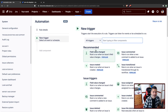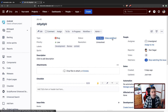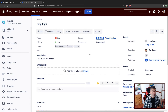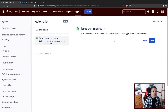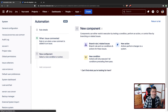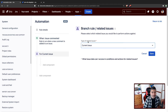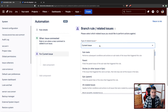Let's create a rule. For the trigger, we could use 'issue commented' or maybe when an issue moves to 'on hold'. Let's keep it simple and use 'issue commented' as the trigger. Now, to add a comment on linked issues, we need to use a branch rule for related issues. Clicking on it shows options like sub-tasks, parent, stories, and epics, but we want linked issues.